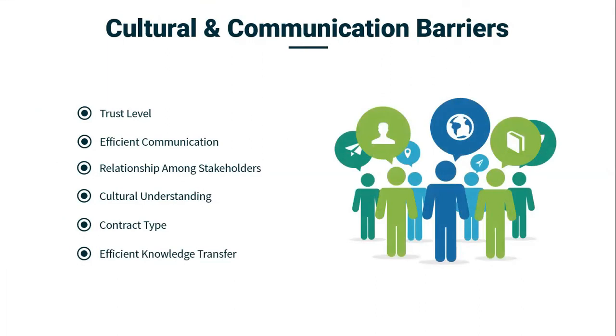Next element of this analysis is culture and communication barriers. Distributed teams help in utilizing services of the offshore or distributed teams to reduce costs or to expand the service round the clock or to provide face-to-face communication opportunity to the client. Usually, the missing part of this strategy is that the teams working on the project are not able to coordinate and communicate the requirements, and as a result, the quality suffers.